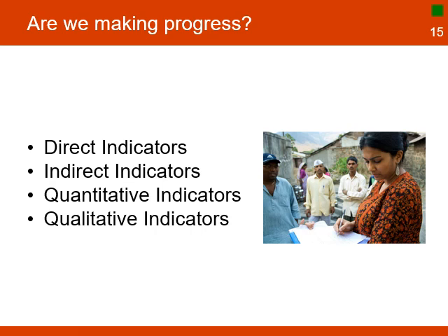Qualitative indicators describe changes that cannot necessarily be captured in numbers, such as changes in behavior, changes in practices, and how people feel about the changes that they are seeing in their groups or in their communities. They respond to questions such as how, why, and what. A good log frame will include both qualitative and quantitative indicators.